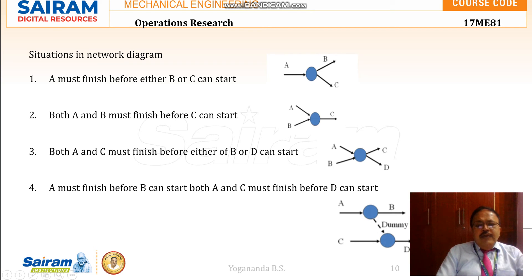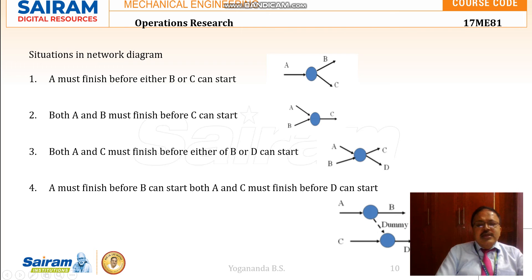If you want to start activity D, A must be over. To start activity C, both A and B must be over. A must finish before B, meaning before starting B, A should be completed. And C must be finished before D can start. Here, we use a dummy activity to make sure that D can be started only when both A and C are finished.